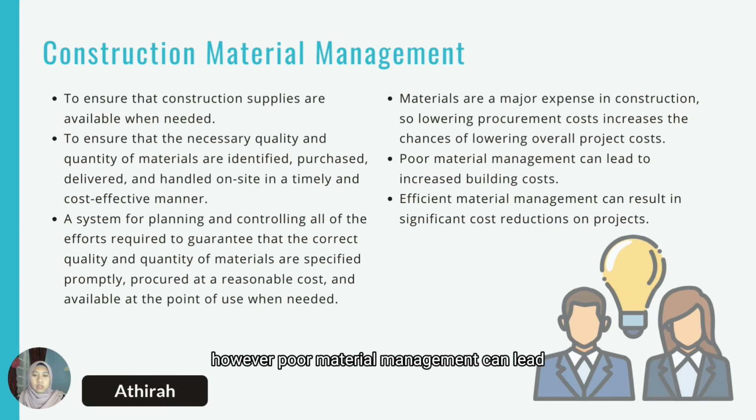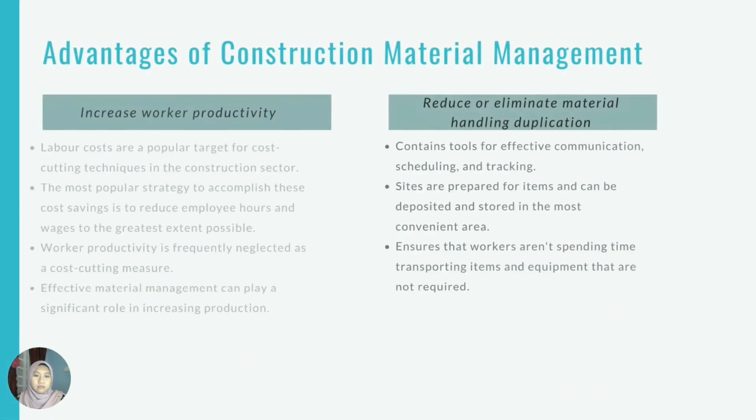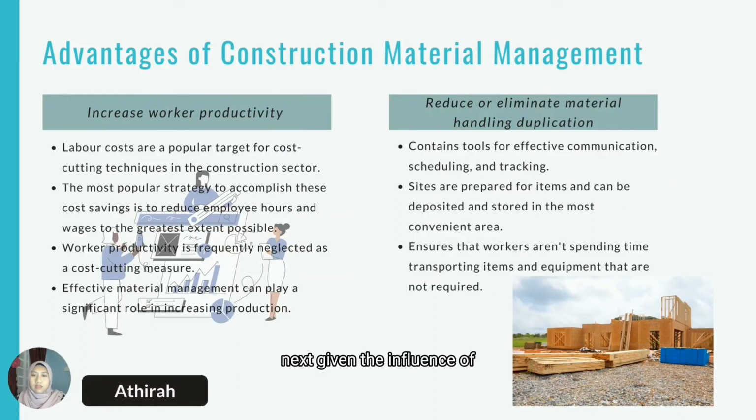However, poor material management can lead to increased building costs, while efficient material management can result in significant cost reductions on projects. If supplies are purchased too early, capital may be held up and interest payments on excess inventory may be incurred. Next, given the influence on workflows and profitability, investing in a materials management system can have a major positive impact on overall construction management efforts.